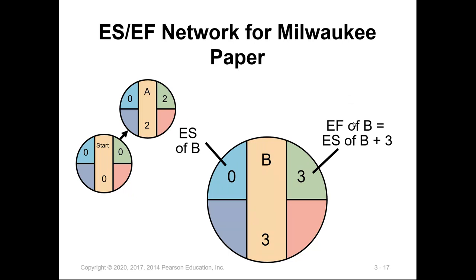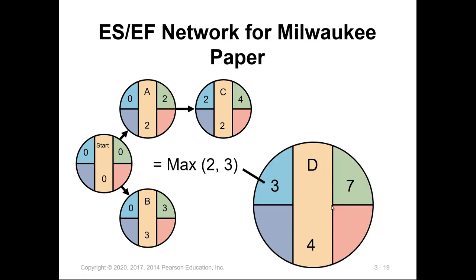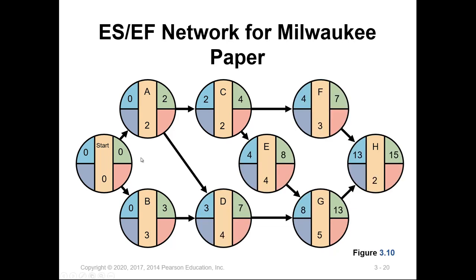Applying the same rule to activity B results in an early finish of 3 weeks — it starts at 0 and with a duration of 3, the early finish is 3. For activity D, which depends on both A and B, we take the maximum of the finish times of those two activities. The maximum is 3, and this constrains when we can start D. So the early start for activity D is 3. Completing all activities, the network diagram will look as shown in this figure.